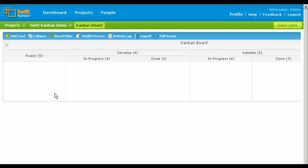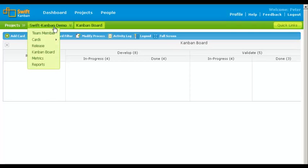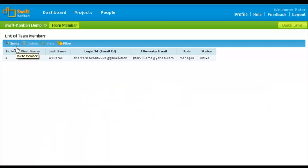Let us now invite team members to our project. Roll over the project name on the breadcrumb and click Team Member. On the list of team members page, click Invite.